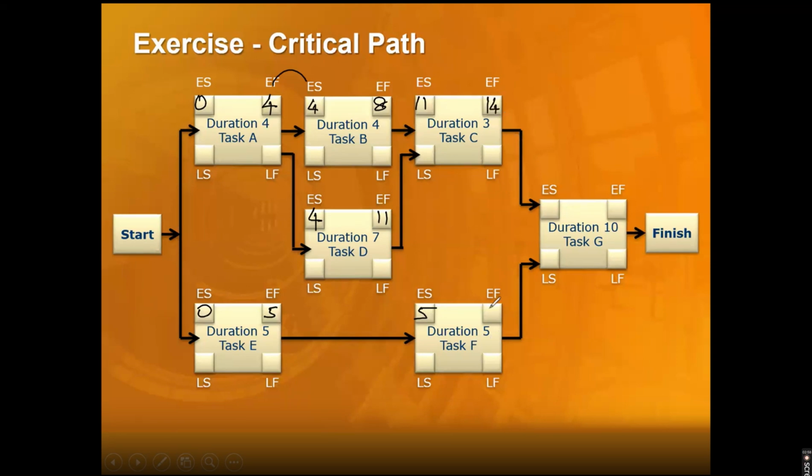And 5 plus 5 will be 10. Now we've got 14 merging on this and 10 merging on this. What should we pick up here? 14. Perfect. Yes, absolutely. 14 plus 10 is 24. Well, that means it will end on, so the maximum duration for this entire process will take about 24 days.